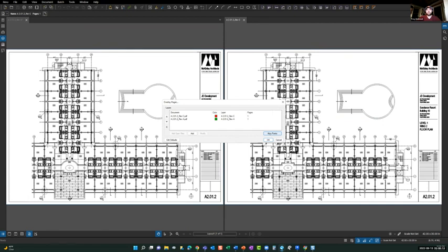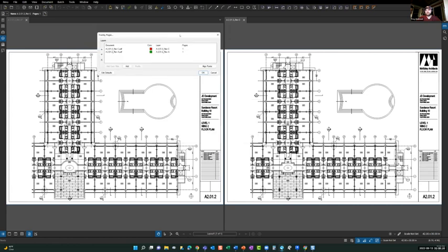That's a great question, because I've seen where an addendum or maybe an RFI gets sent over on an 8.5 by 11, and it's only this small portion of the drawing. Well, you can still pick points within that bathroom and overlay the 8.5 by 11 over this full-size document and see what changed. It doesn't have to be a full sheet deal. And for that matter, even if it's not to scale, it will scale it and place those over top of one another.